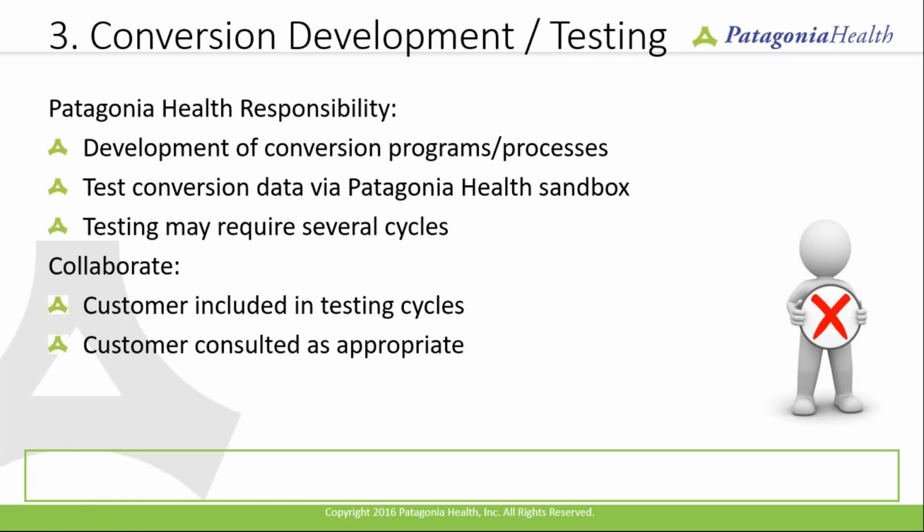The third step is largely a Patagonia Health technical team step. This is developing the conversion program and some initial testing. So Patagonia Health is responsible for the development of the conversion programs and any of the processes required for your project. We will also test the conversion data. We'll use our system to do that. We'll compare the results to the scope definition provided in the previous step. So we'll just follow the instructions that were created during the scoping of the data migration.